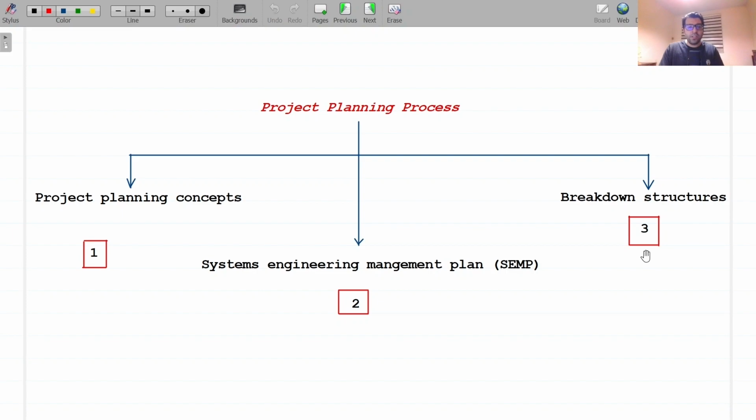An identification of all activities and resources needed to produce the product, a cost relationship to the activities being performed, an organizational context for the project to perform the activities needed to produce the product. An identification by name within the organization of the responsible person for performing each activity.